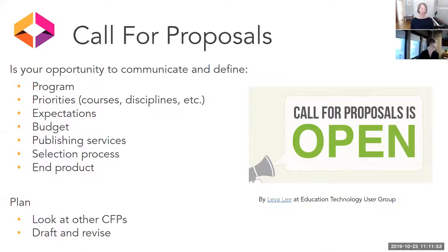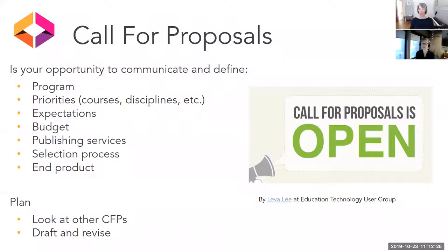In your call for proposal, it's really important to be clear and provide detailed information about what courses or disciplines your publishing program will be targeting. You'll also want to communicate funding and budget models — for example, will you be offering a course buyout? You'll want to include what publishing services your program will offer, the criteria for how proposals will be selected, and your expectations for what the end product will look like.